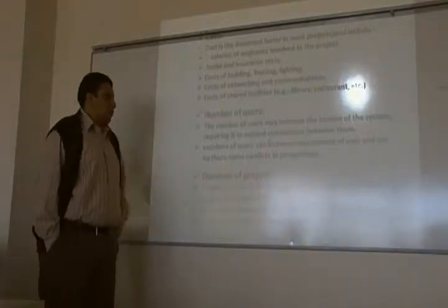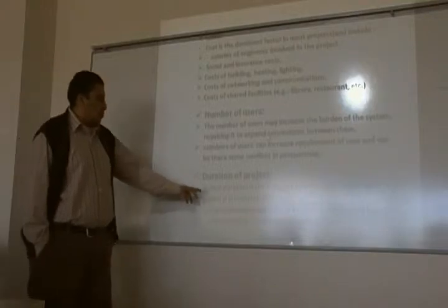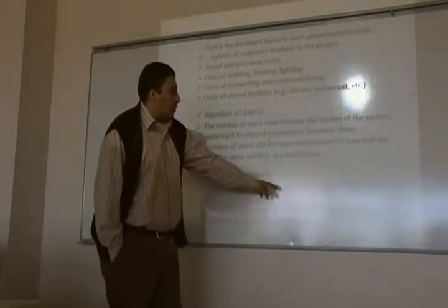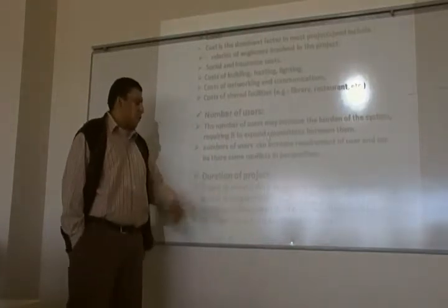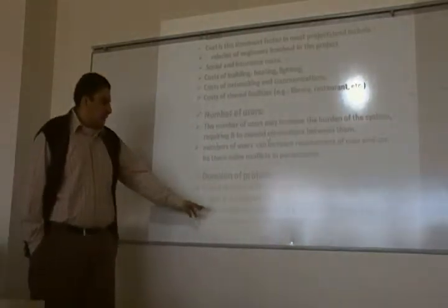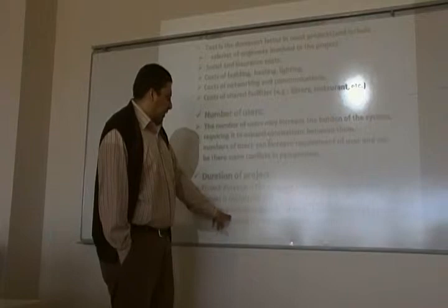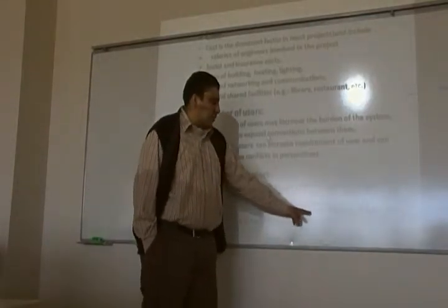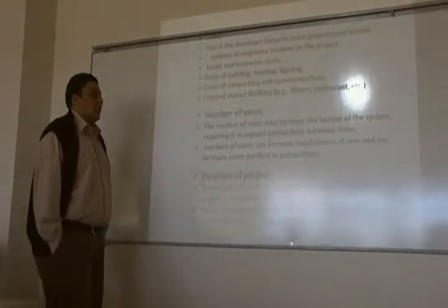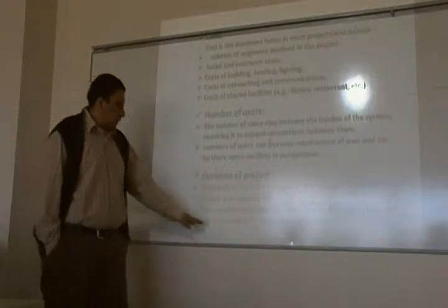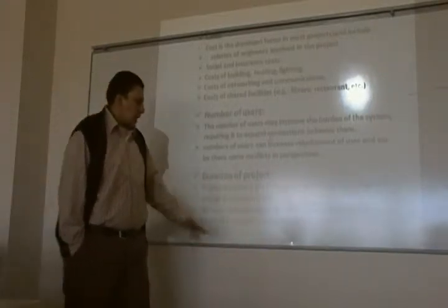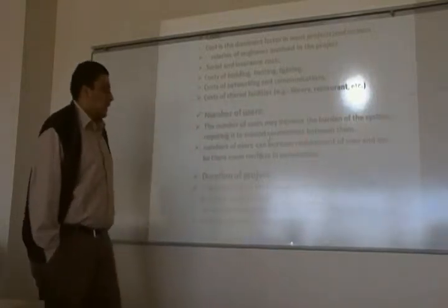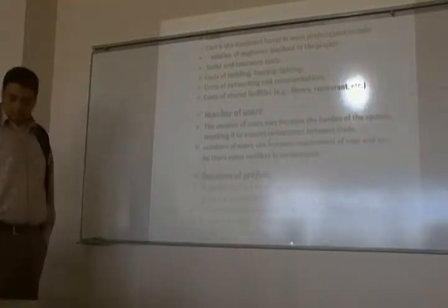Duration of project. Project duration is a measure of the number of months until the project is completed. You can estimate project duration with an estimate of software size. Size is measured in function points for projects. I think function points are related to use cases.